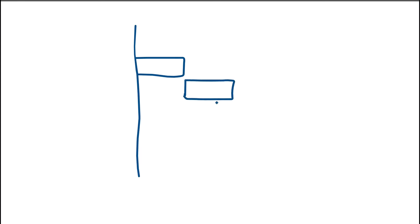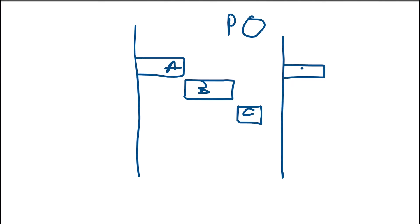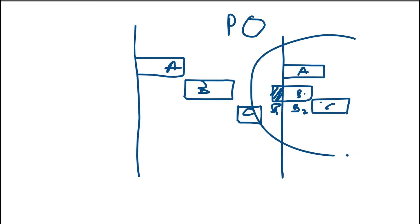Now let's consider the same scenario with activity A, B, and C, but this time using progress override in P6. Assume activity A has not started, but activity B has started. What will happen now is that the logic will not be respected anymore — the progress will be overridden. The part of B that has started is B1, and B2 is the remaining part yet to be completed. C will still follow the logic between B and C. This is an out-of-sequence activity — B is not respecting the logic between itself and A anymore, and C will follow activity B.